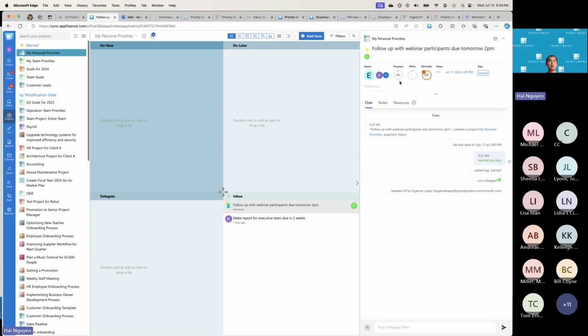In Pretty Matrix, if you use subtasks, let's say you have 5 subtasks and you get 2 of them done, then the progress updates to 40%, but you can also override it as needed. What I use progress for is a way to notify everyone within this item that work has been done. Imagine you have a very important task that will take 2 weeks to work on.